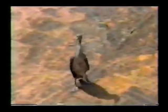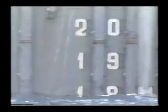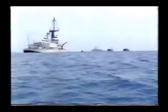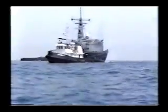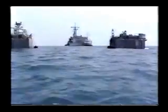And not only is the US Navy interested in this trip, with the ballasting operation complete, only the marks of the guideposts can be seen. The Samuel B. Roberts can now be towed over the deck of the Mighty Servant II. Two tugs are required to do this job safely. Fenders have been placed alongside the casings astern of the lift vessel for additional safety.